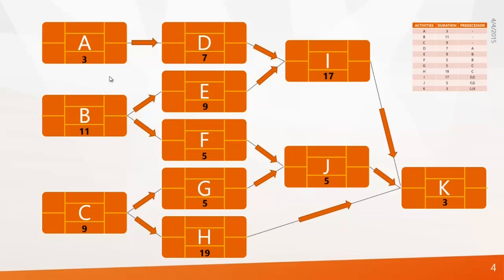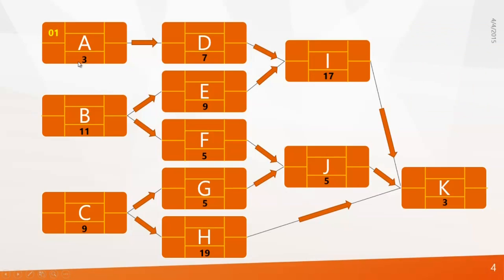Let's assume our project starts on day 1, so the early start of activity A is day 1. Since A, B, and C start simultaneously, the same date goes to B and C. Next we find the early finish of these activities. Activity A starts on day 1 and needs 3 days to complete, so it finishes on day 3. The equation is: early start plus duration minus 1 equals early finish. The same equation is followed for B and C.